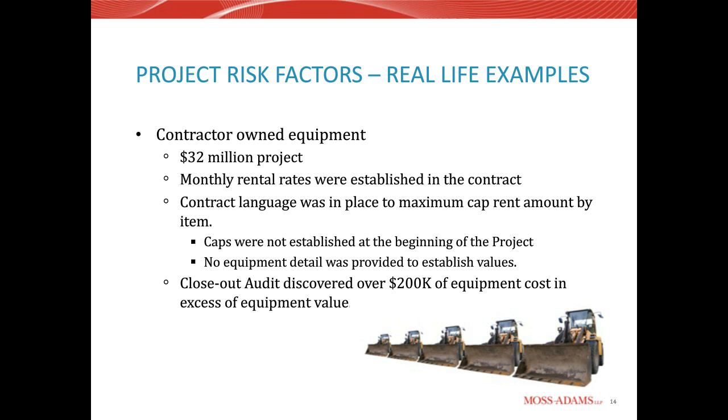For this specific example, it was a $32 million project. Monthly rental rates were established in the contract, so it was by item how much they were allowed to charge on a monthly basis. The contract did have language establishing maximum caps by item. And by item, what we're talking about is, for a pickup truck, if you're renting a pickup truck and the monthly rental rate is $1,200 a month, what is the cap on that piece of equipment?